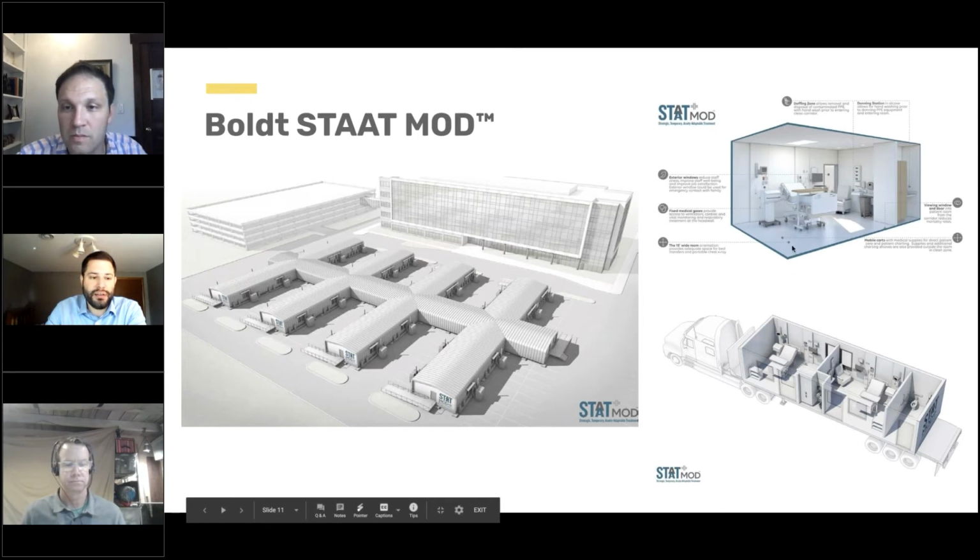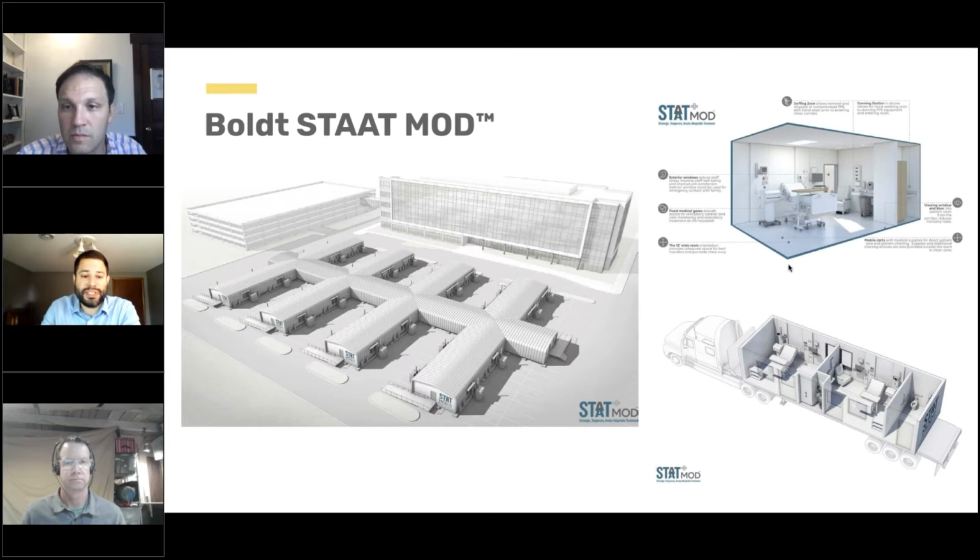We're working several states away for the install. So we've got three separate cities that we deployed in for one project, where we're taking photos daily in the fabrication facility so we can track the status of these mods and understand the in-wall and above-ceiling work and all that, because these things are cranking, it's going fast.